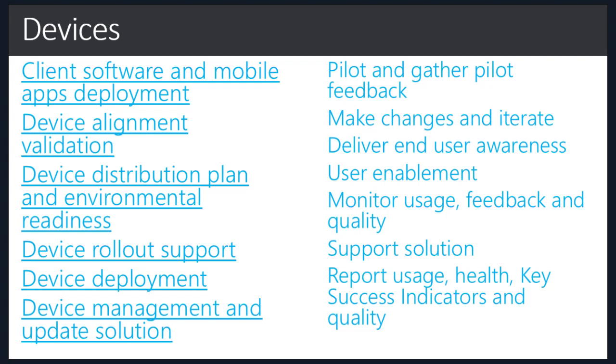And then also there's a task around planning for device distribution, be that centralized or distributed device distribution. Depending on the scale of rollout and market availability, centralized distribution may make sense. However, considerations around lead time and customs declaration impacting the lead time must be addressed.